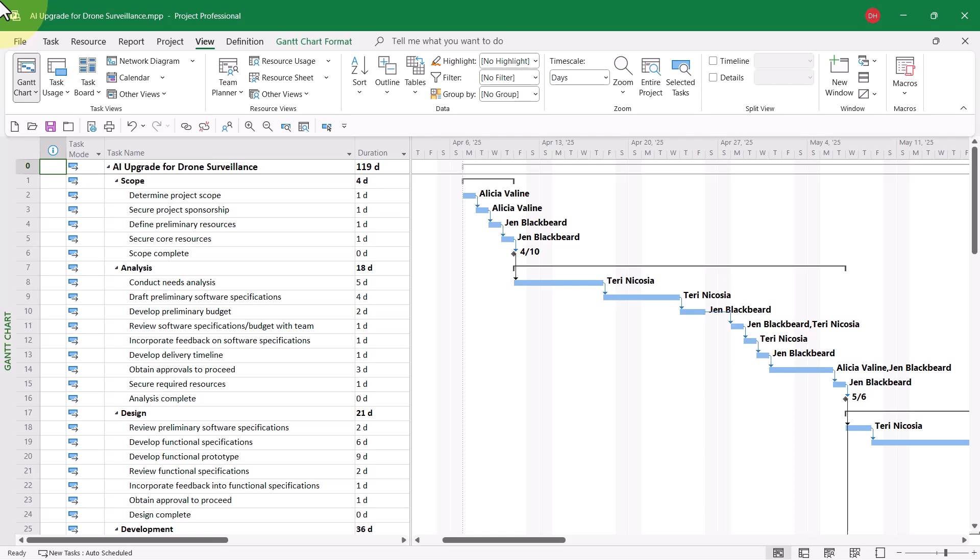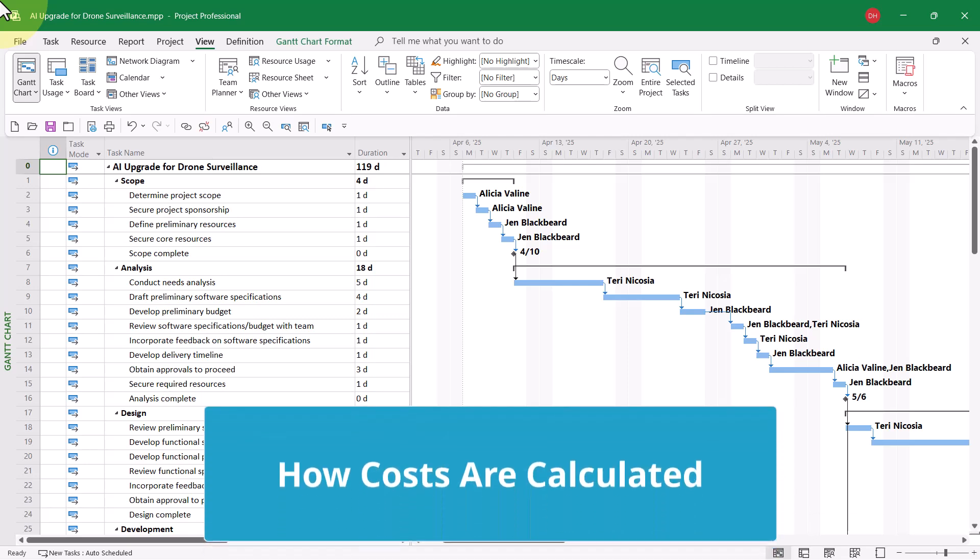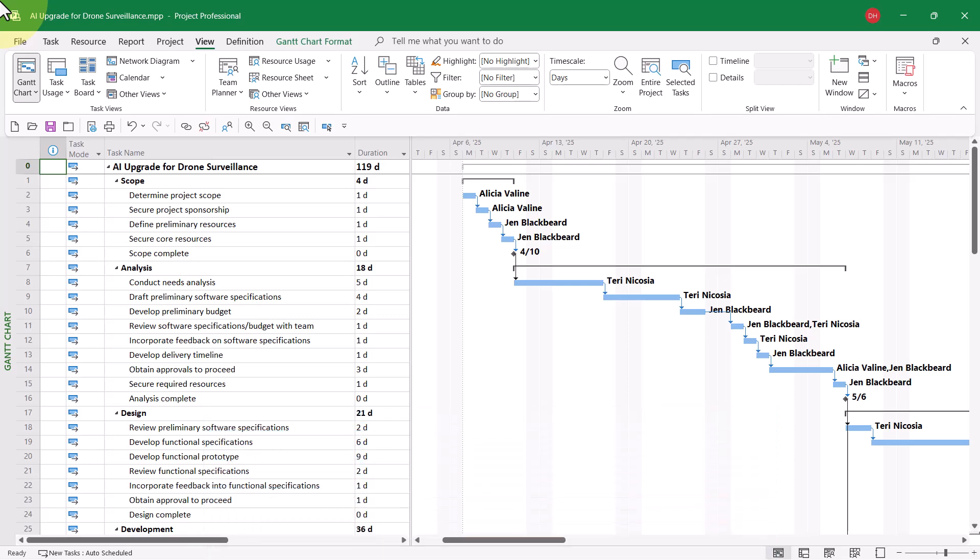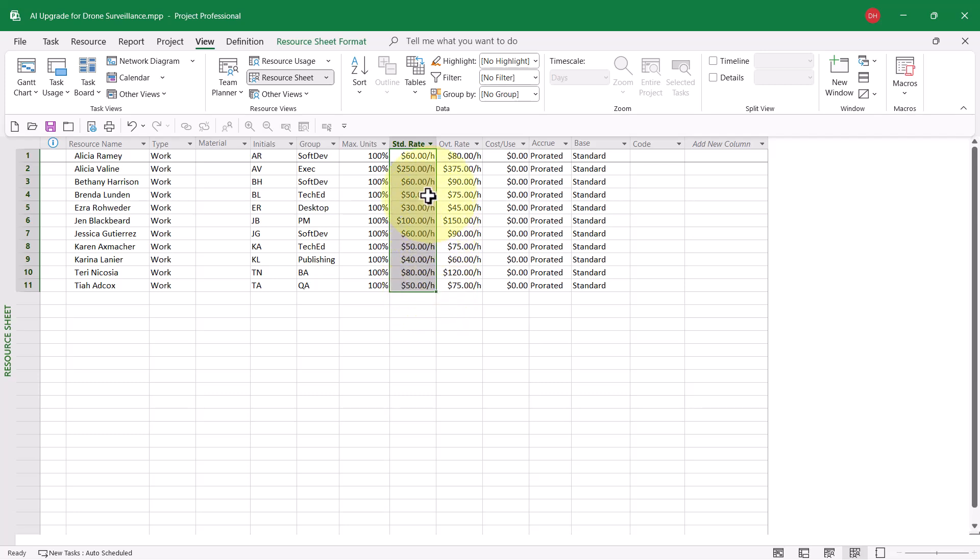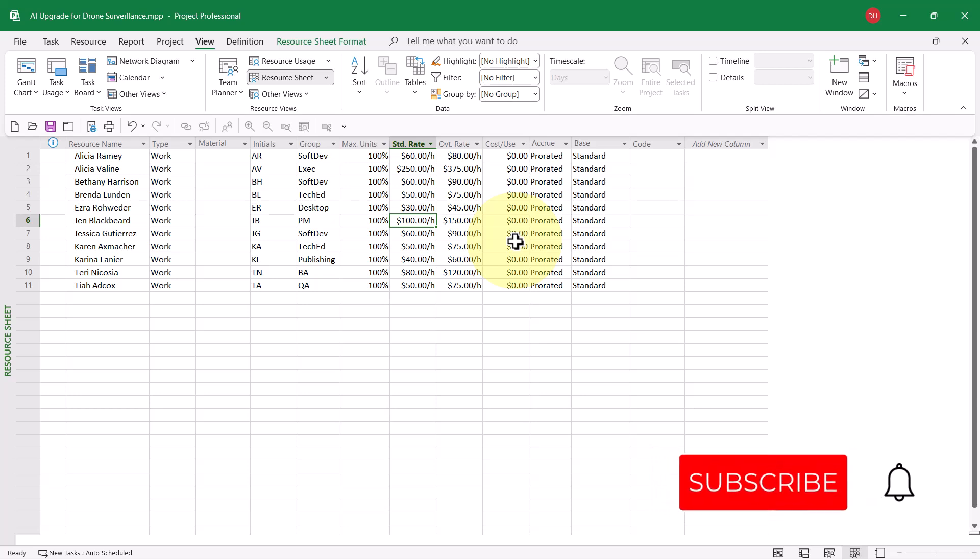Before I show you how to create the cash flow visual report, let me show you how costs are actually calculated in this Microsoft Project schedule. I'll go first to the resource sheet view, where you can see that every resource in this project has a standard rate specified. Notice, for example, that Jen Blackbeard's standard rate is $100 an hour.